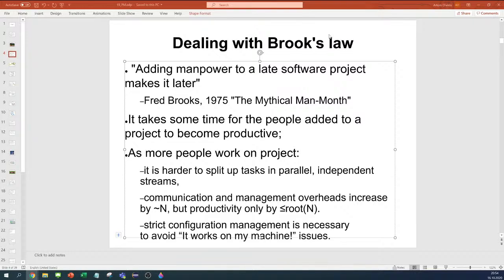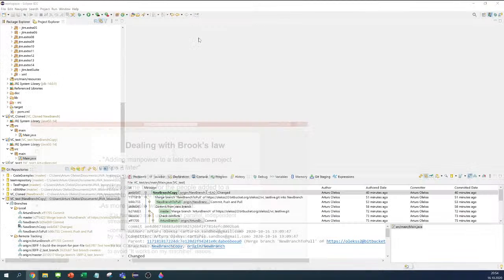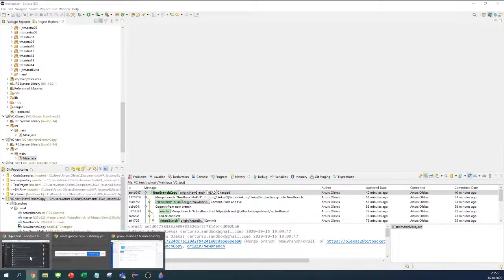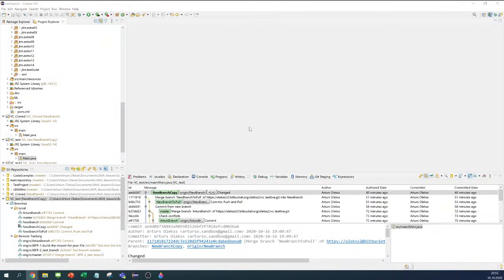And what I want to see is how you deal with Jira, that for each task you create the ticket in Jira, then you move this ticket from to do, then in progress, then it is done. Yeah? So there's just 3 stages. In practical life there may be more than 3 stages.